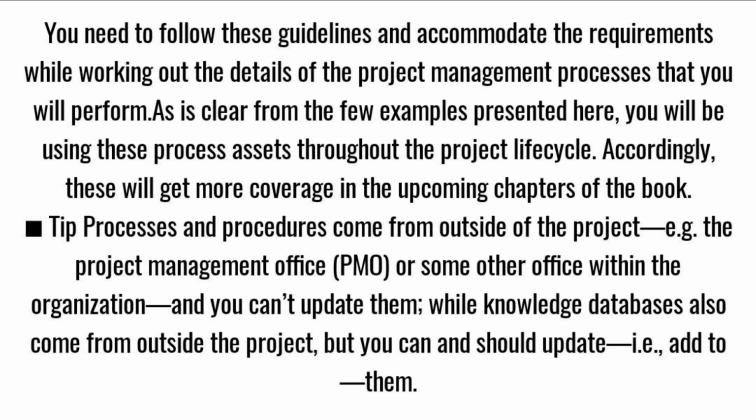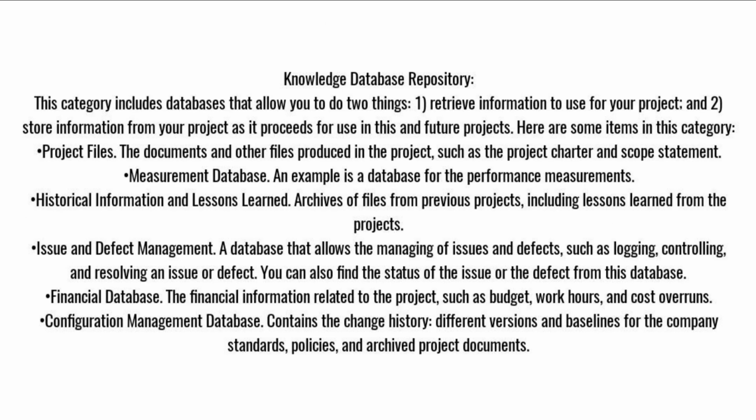Tip: processes and procedures come from outside of the project, e.g., the Project Management Office, PMO, or some other office within the organization, and you can't update them, while knowledge databases also come from outside the project, but you can and should update, i.e., add to them. Knowledge database repository. This category includes databases that allow you to do two things: 1. Retrieve information to use for your project, and 2. Store information from your project as it proceeds for use in this and future projects. Here are some items in this category. Project files.